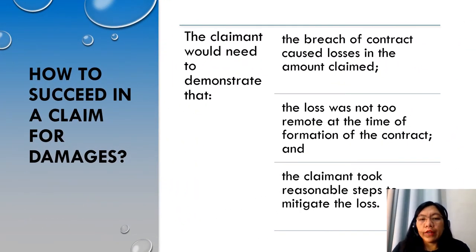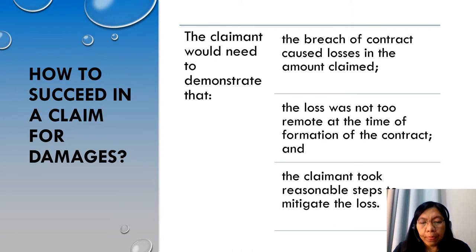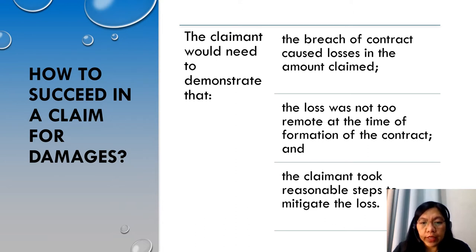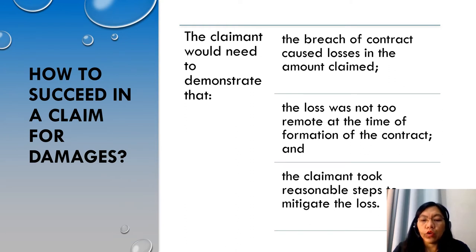Now that we know the differences between liquidated and unliquidated damages, the next question is how to succeed in a claim for damages. According to the principles of the law of contract, to succeed in a claim, the claimant would need to demonstrate the following: first, the breach of contract caused losses in the amount claimed; second, the loss was not too remote at the time of formation of the contract; and the claimant took reasonable steps to mitigate the loss. We will discuss all three in more detail in the next slides.